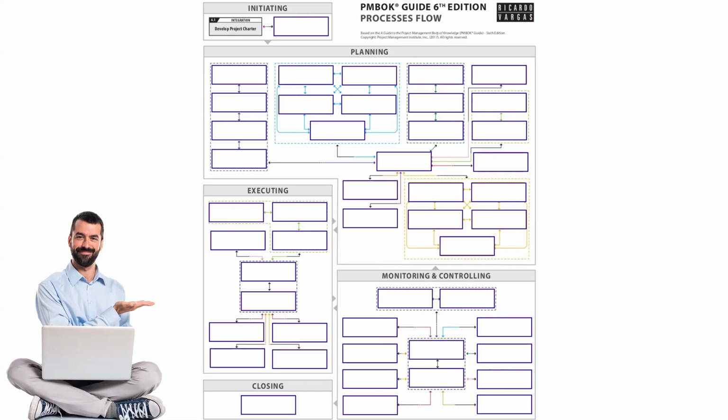In principle, the project sponsor or the steering committee are the people who should be able to authorize a project. They should be the authors of this charter. But I do understand in most organizations, these people do not have enough knowledge about how to create a charter. Therefore, it is allowed that they can seek help from the project manager who has just been nominated to help them create the charter in a proper format. But at the same time, that project manager is never considered as an author of the project charter. The order comes from the steering committee or it is signed by the project sponsor. Is it right in your case?